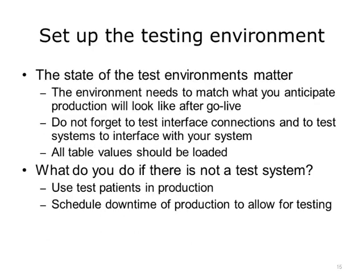The state of the test environments matters. The environment needs to match what you anticipate production will look like after go-live. Do not forget to test interface connections and to test systems that interface with your system. All table values should be loaded — for example, if a patient is admitted to Nursing Unit 5 South in the patient management test system, but 5 South is not configured on the EHR test system, the admission message will fail when received by the EHR test system. Occasionally a test system might not be available; this should be avoided as much as possible. However, sometimes the vendor will allow you to borrow a test system or test instance in the cloud. Sometimes test patients in production can be used, although this is dangerous because you do not want to corrupt production and want to limit production use for HIPAA reasons. Also, many tests require multiple patients. Sometimes you might have to schedule downtime of a production system to allow for testing — this is a last resort.